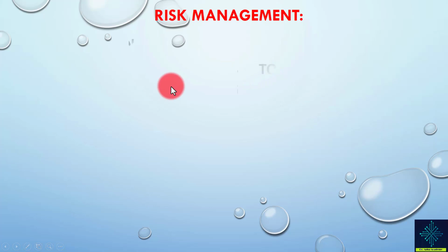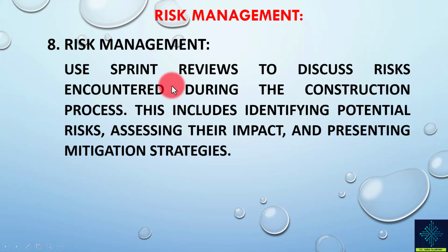Risk management. Managing risks is a very essential part, and we have to use the sprint reviews to discuss risks encountered during the construction processes. This includes identifying potential risks, the expected risks and the unseen risks, seen and unseen, and then assessing their impact and also their likelihood or probability, and getting what we call a risk score.